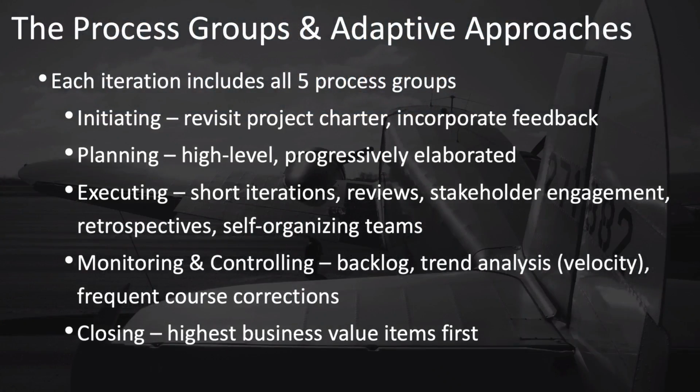Initiating processes in which you revisit the project charter at the beginning of each iteration and incorporate feedback from previous iterations. Planning is often done at a high level at the beginning of the project and then progressively elaborated with more details being added to the tasks or user stories to be done in each iteration.